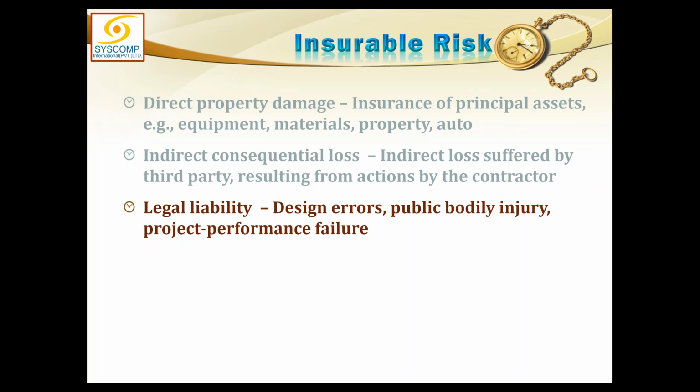This could be design errors, bugs, bodily injury, project performance failures. All these things you must be protected from. So you could have a legal liability insurance.